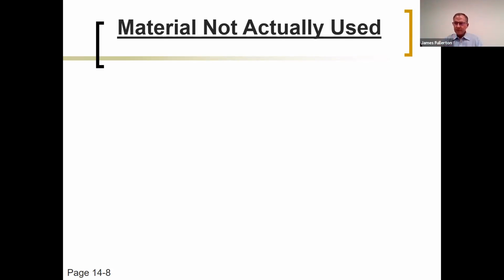When you deliver a pile of lumber out in the parking lot of a construction project, and the project just stops right there for whatever reason, you do not have mechanics lien rights because your materials have not become a part of the real estate.